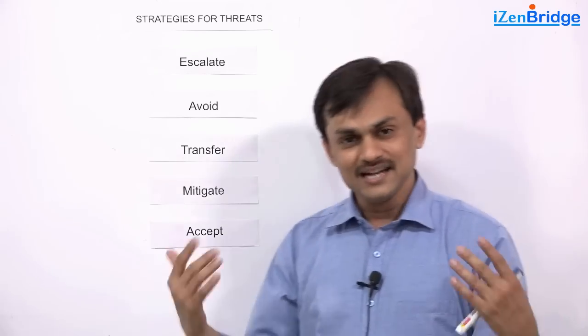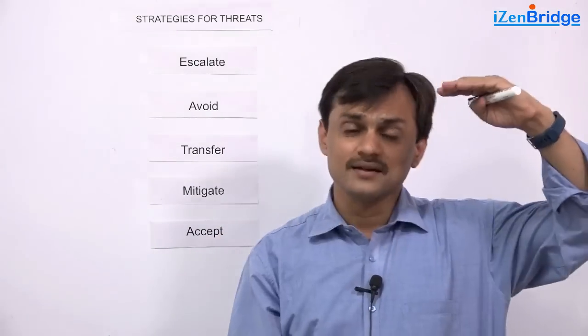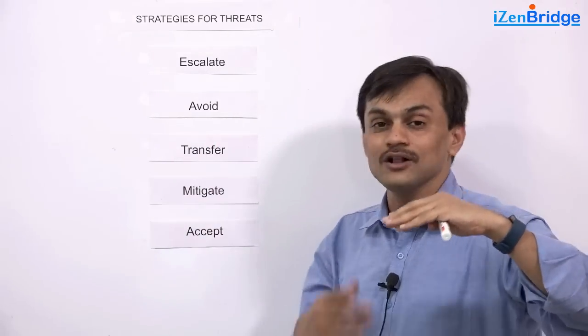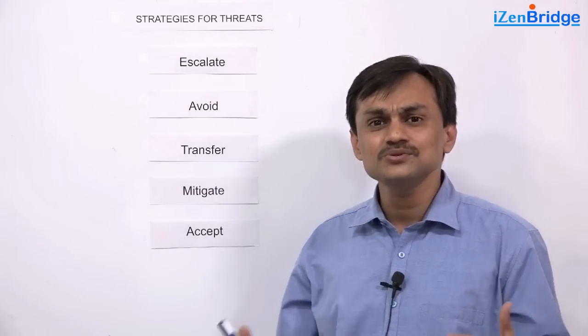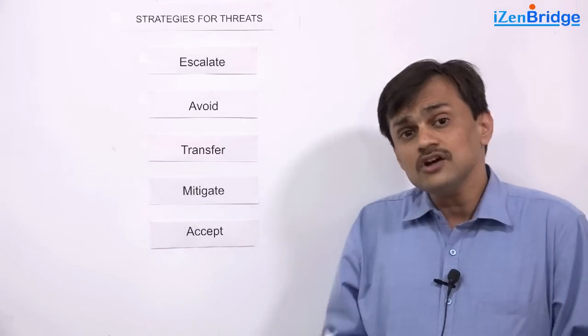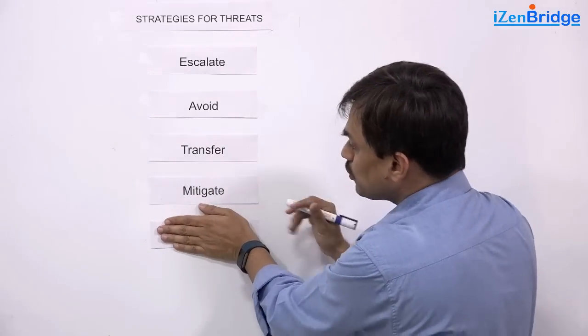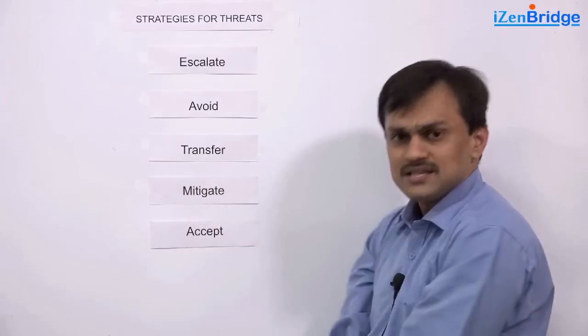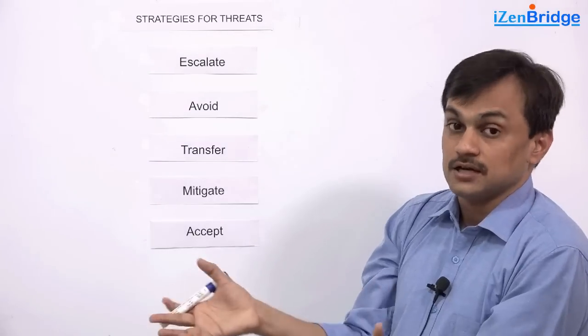Accept. Yeah, let's face it. Whenever it will come, we will see. You have so many risks and if you start mitigating and avoiding all those risks, your project may never get started or it may never get finished because you end up spending too much energy on each and everything. There are a set of risks which you need to just live with it. You don't do anything about it. If you don't do anything of these four for a risk, you are accepting it. You will see it as it comes.